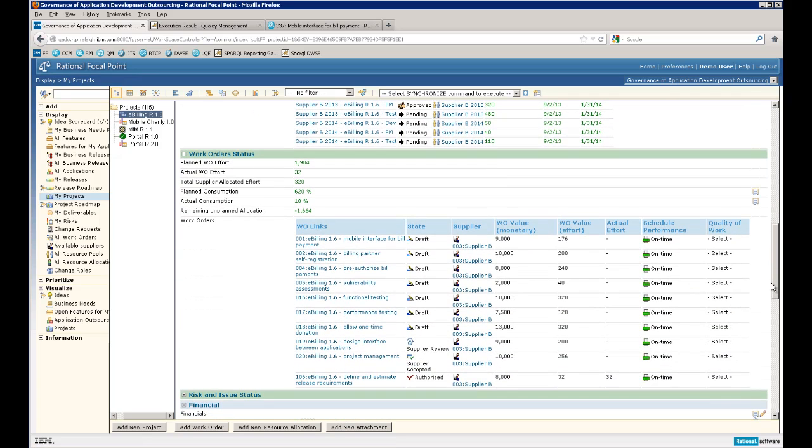They're not intended to replace the legal contract, but define the smallest increments of work authorized within that contract, like a mini statement of work, and can be as granular or as broad as needed. In an in-house scenario, work orders might be handled differently, but might still be useful to provide visibility into work being performed and agility in managing scope for larger projects.